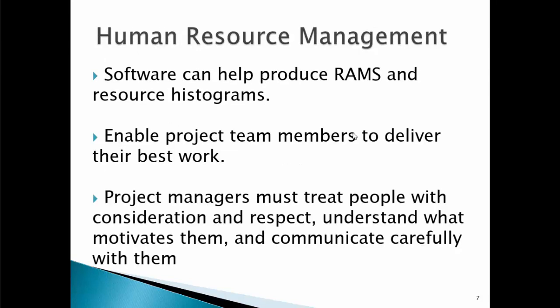To manage human resources, software can be used to create the resource assignment matrix and the resource histograms. By using project management software for human resource management, you can assign resources, identify potential resource shortage or underutilized resources. You can also level the resources.